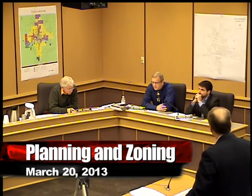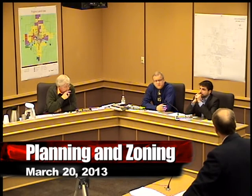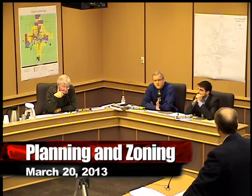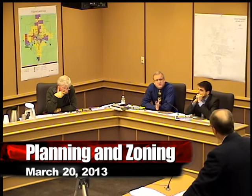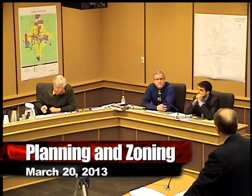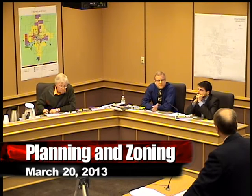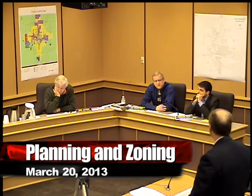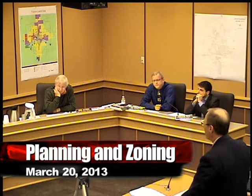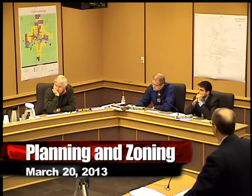With respect to that, Mr. Chairman, I could just say that issue could be ferreted out as part of the development agreement. Okay, I'm just putting you on notice that you have to have 2 access points. Obviously, the fire department and the city engineer will be involved with respect to that condition. Just as long as you're aware of that, just as much as you are aware with the apartments that you're building, you could only go up to 100 until that additional access point was built. So that's the same condition for this one here, and those could be part of our discussions for the development. Yeah, I think that's the proper place to do that, and we're happy to do that and understand it's part of what we need to do to go forward.